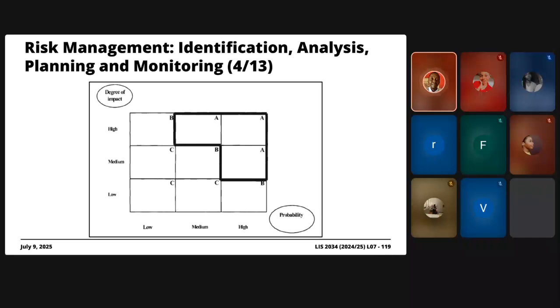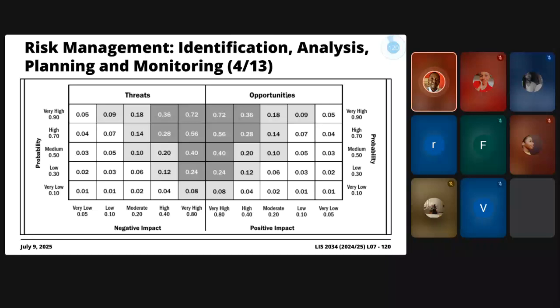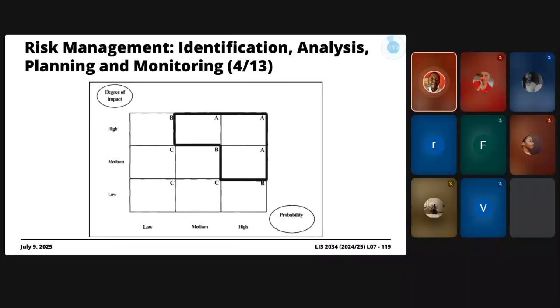So what we're saying is that you'd want to prioritize focusing on or keeping an eye out on the risks that are in this A quadrant here. Why? Because these are the ones that are more likely to happen and at the same time have the most adverse effect on the project. Not that I'm saying you're neglecting the others, but in terms of directing resources, you'd be directing more resources to these things that are in the top right corner, in essence.